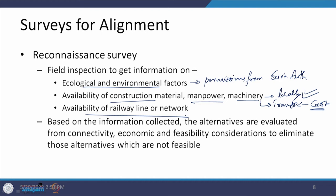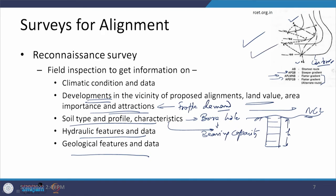We should also find out if the construction material, though available, can be modified locally to meet specifications. Availability of any other network or railway line developed over time is also to be considered. Once we have all this information on the 3, 4, or 5 alternatives drawn during desk study and examined during reconnaissance survey, we look at what can be dropped. For example, the shortest route passing through many contours may not be feasible, so we may go with flatter gradients and reduce from 4 alternatives to 2.